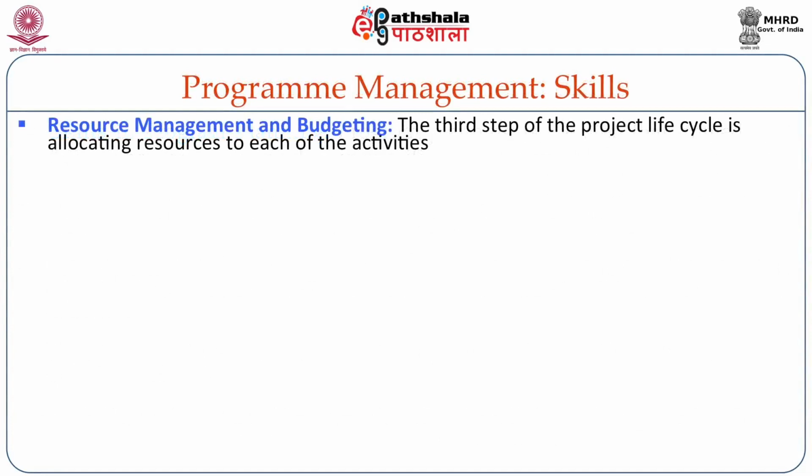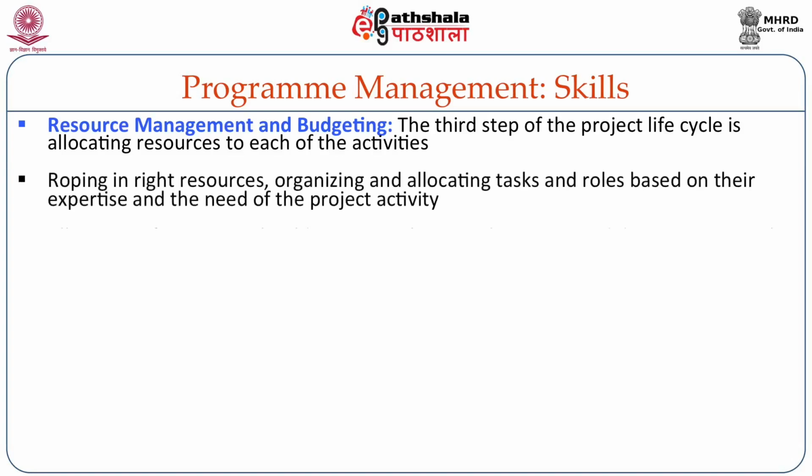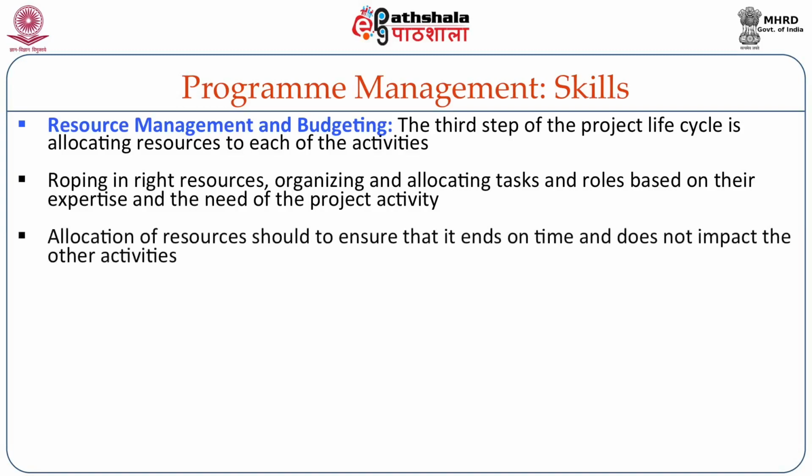When you are looking at resource management and budgeting, the third step of the project life cycle, it is allocating resources to each of the activities. So what are the skills required? Roping in the right resources, organizing and allocating tasks and roles based on their expertise and the need of the project activity. Allocation of resources should ensure that it ends on time and does not impact the other activities.